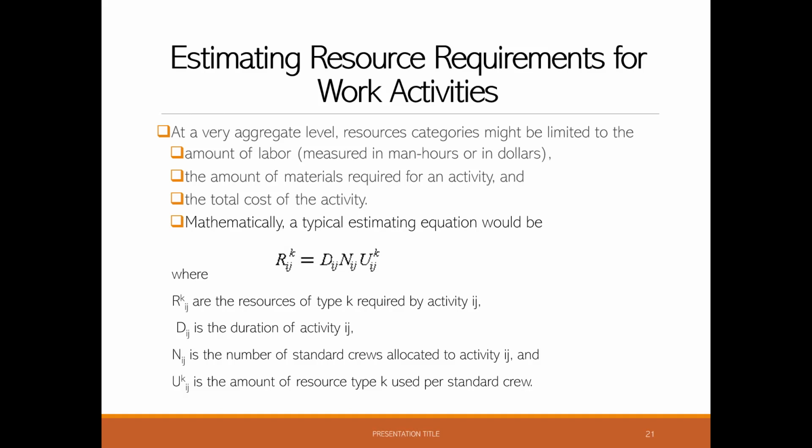Clearly, assigning additional crews might result in faster completion of an activity. However, additional crews might result in congestion and coordination problems, so that work productivity might decline. Further, starting a particular activity early might not result in early completion of the entire project.